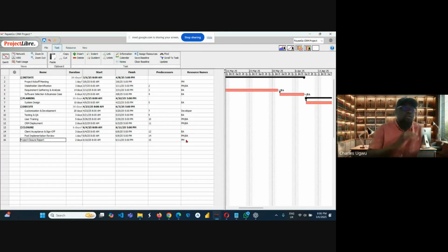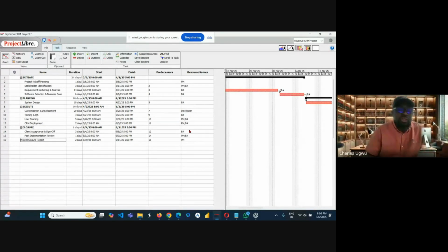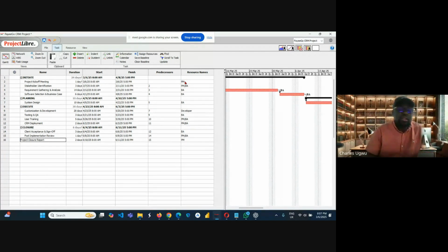You might say they are not doing anything. They are, but these are responsibilities where they have to do this on their own. Under our RACI matrix, this is responsibilities. This is not accountabilities. But in terms of accountabilities, they are still part of every one of these activities. But these are who are responsible for doing this. We're talking about responsibilities. So we have assigned responsibilities to this.